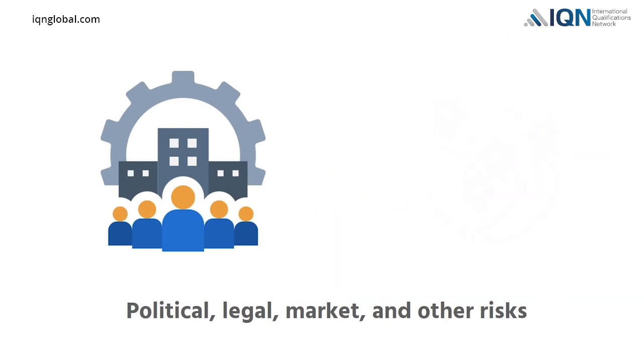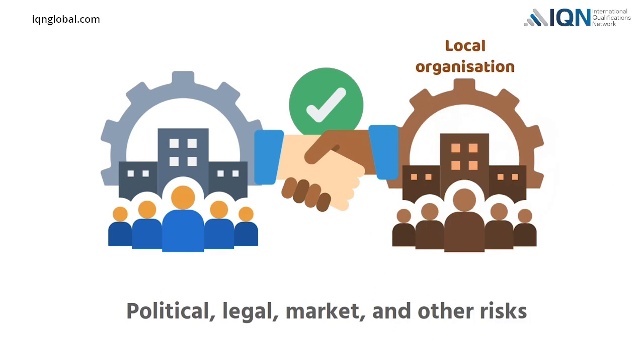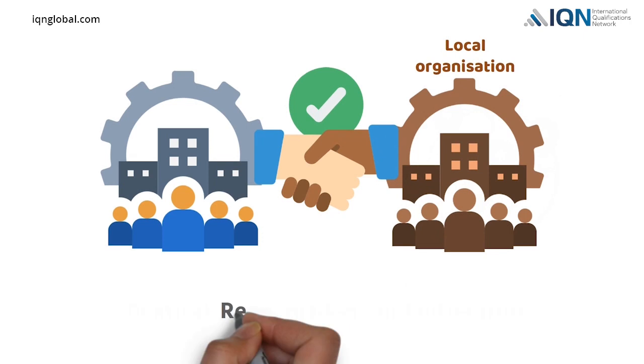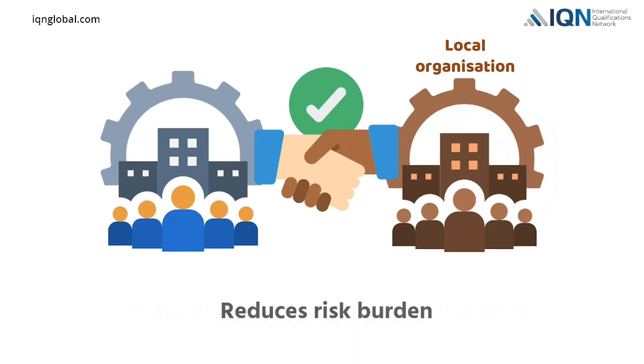Many organizations that work on international projects will share political, legal, market, and other risks associated with overseas projects by developing a joint venture with an organization located in that country. Partnering with a local organization will reduce risk burden because the local organization has local expertise and experience that the international organization does not have.